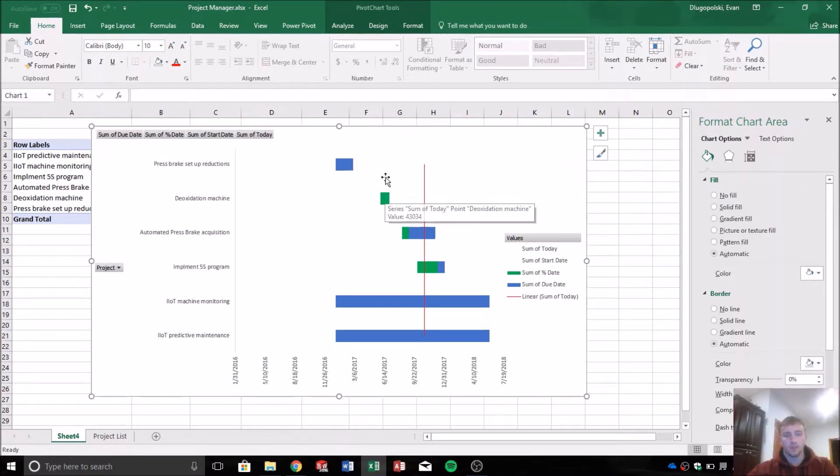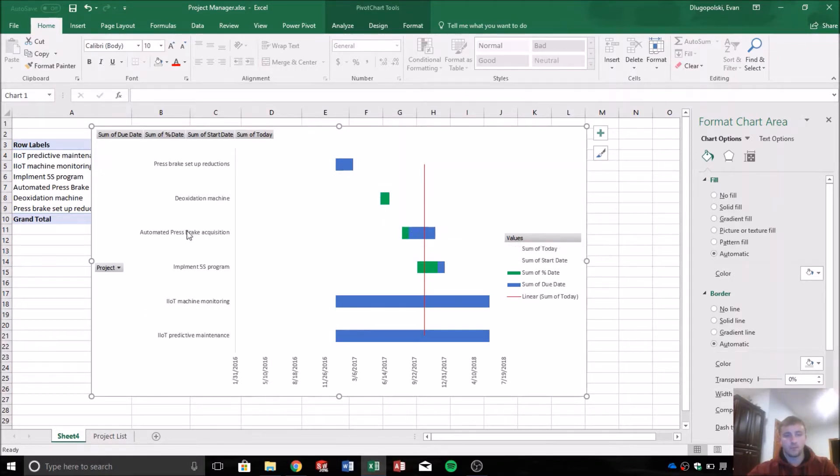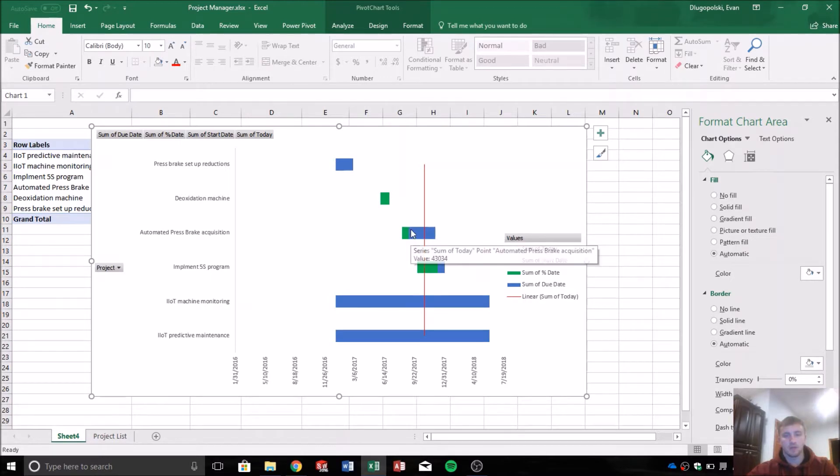That project is overdue. This project is behind today but it's complete, it's solid green. So that project is complete. This project is behind schedule. It hasn't hit its due date, but you can see by the percentage complete that it's behind schedule.